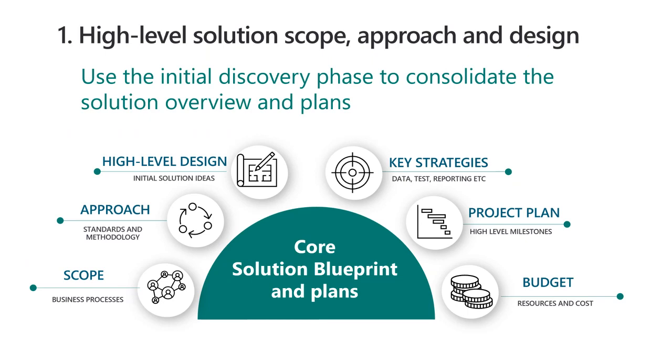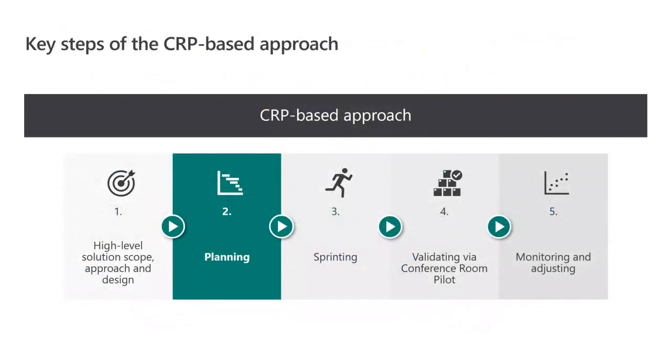You should also have a high level, at least a milestone level project plan. And of course, it's likely you're going to have a budget as well. Most projects at the kickoff will have all of these in some degree of preparation. The idea here is that you bring it together and assess your readiness to make sure that before you start your sprints, you're in good shape. And if it means you have to take a little bit of time to get them to that shape before sprinting, it's worth your while because it allows the sprints to flow more freely without having to stop and start again. So let's talk about the planning.